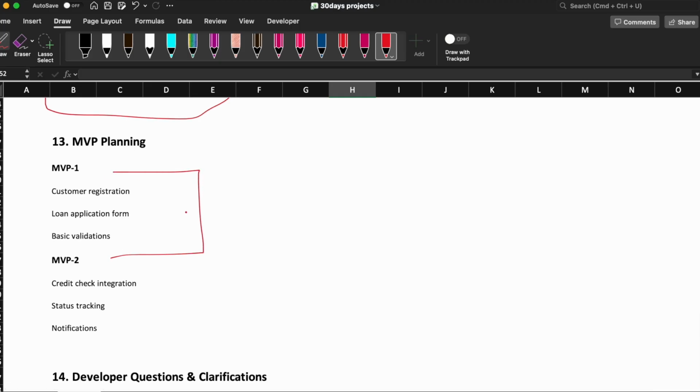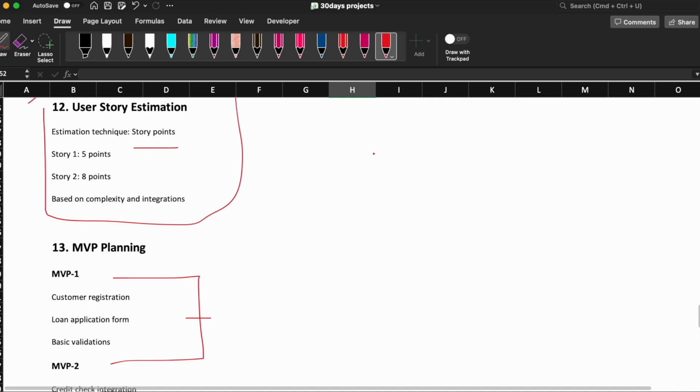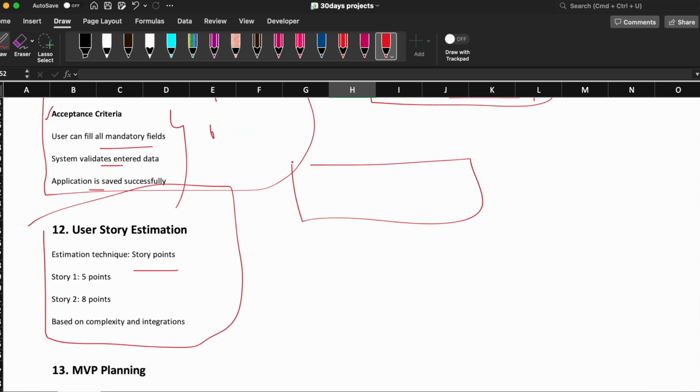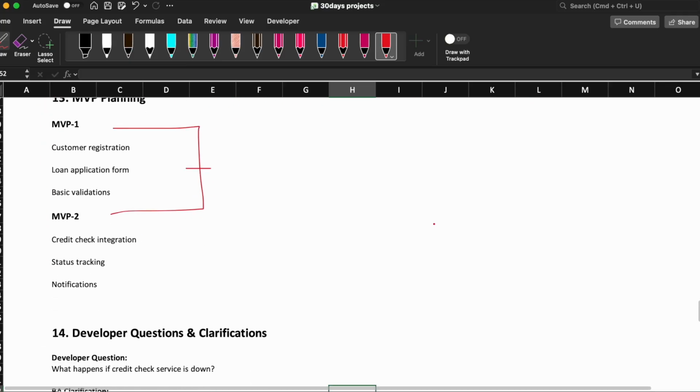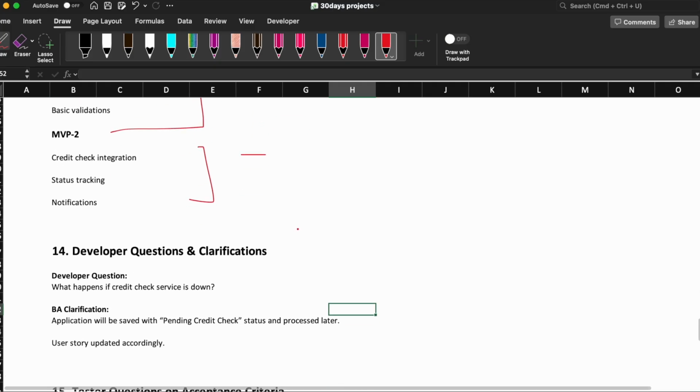Before we start a project, you do the user stories. You will not write all the user stories in one shot, but at least you have the epic, and you have created some title-level stories, and you put them in different MVPs. First MVP, we need this feature. Second MVP, this. So March build, April build. That's what we plan.